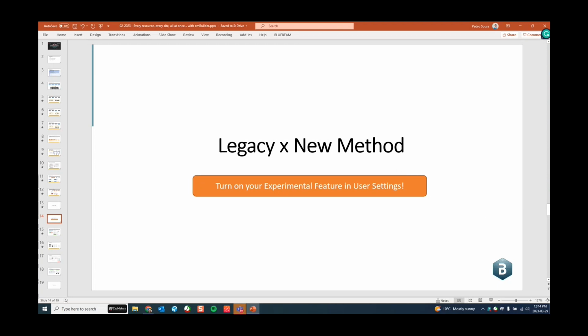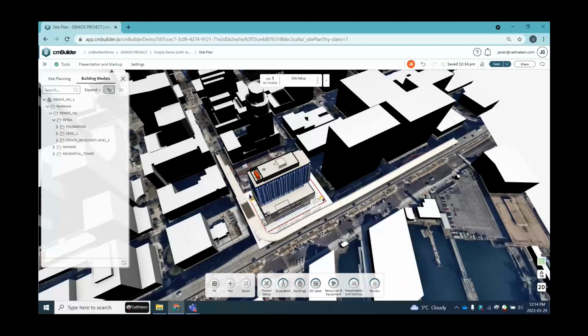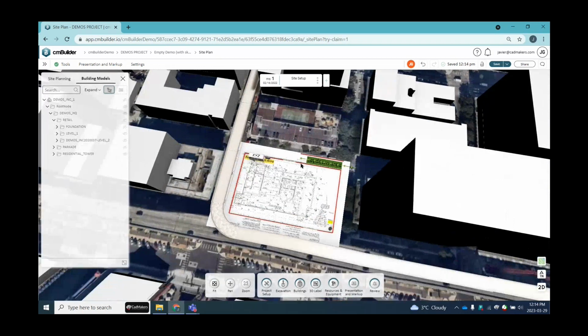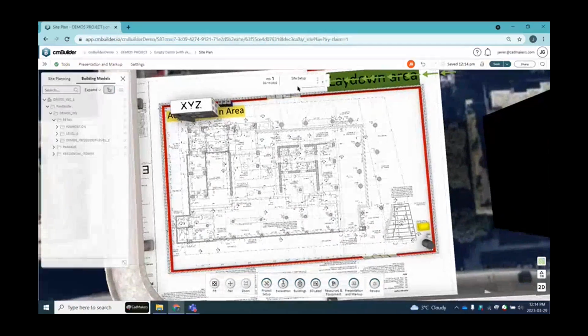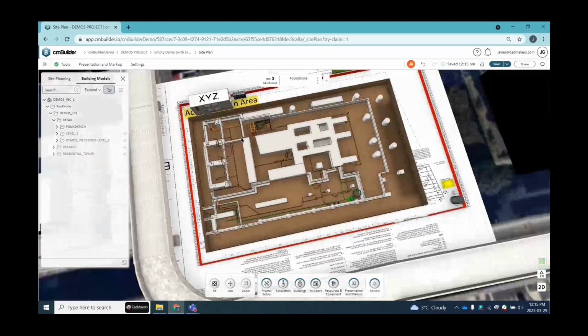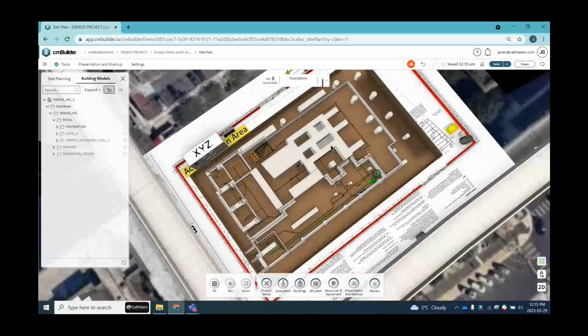Okay, so some of you may have seen me do a demo or shown some of this in the past. I'm just going to quickly go over how the legacy sequencing strategy has been. Typically, you would plan your logistics and your sequencing from, say, site setup to bulk excavation, to foundation. And when you get to the part where you start turning on aspects of the model, you would find those parts inside the tree and say, okay, I'm going to execute foundations at this milestone, right?